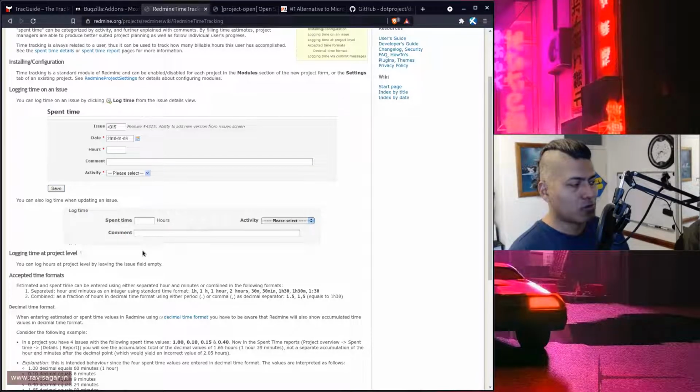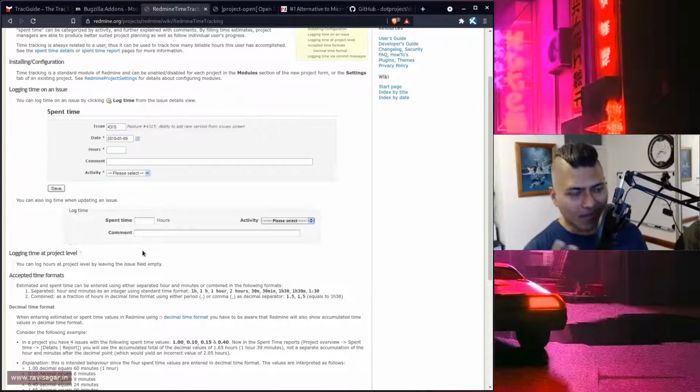But more than logging my actual time, I was also interested in planning with the original estimates. For example, when you make a plan, the plan can have, let us say, 5 items that you need to do. And for those five items, you may further break it down, talking about traditional agile terms like epic, stories and subtasks. So I was always looking for that kind of functionality in these tools, where I can store not time, but the estimate, the original estimate, and at the same time, I can then log time against those original estimates.